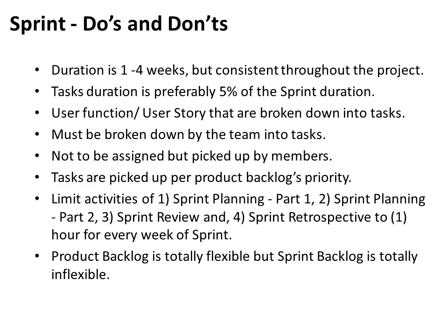And to ensure that, the product backlog is totally flexible, but the sprint backlog is totally inflexible, meaning once it has started, you do not add more stories to it. You may add stories at the end in case you finish and there is still some time left in the time box, but adding any additional story while the sprint is ongoing is a bad idea and a recipe for disaster, and should be avoided.